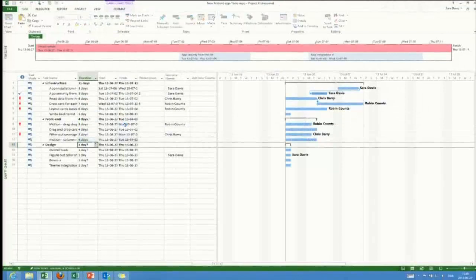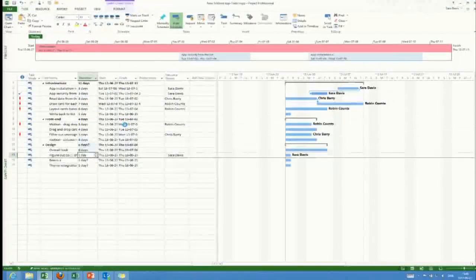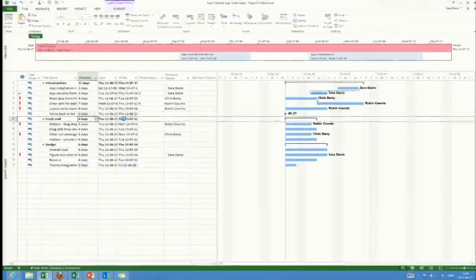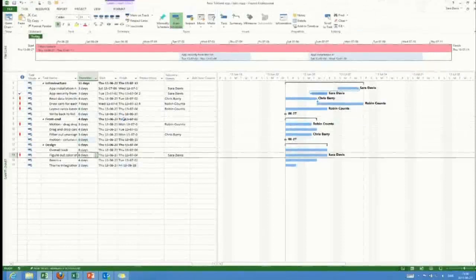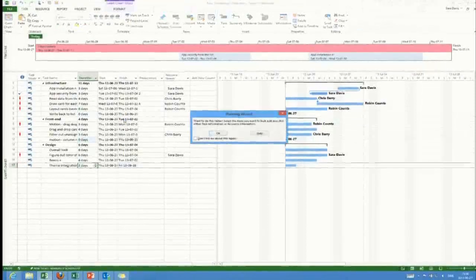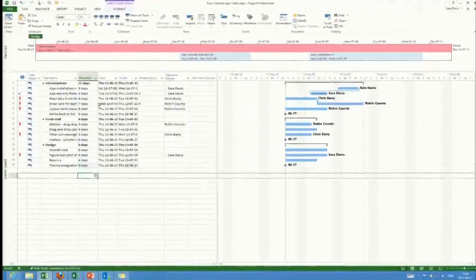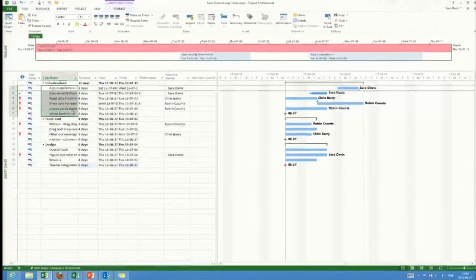Automated tasks, for those of you who've used Project 2003, 2007, or maybe still 2010, are the ones that Project will constantly calculate every time you make a change in the plan. As Mon said, the manual tasks stay where you put them. Now, you could do that before using constraint dates, but most people tend to get quite confused about constraint dates.